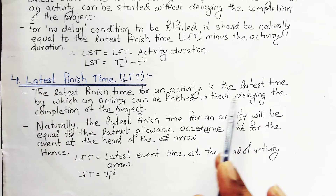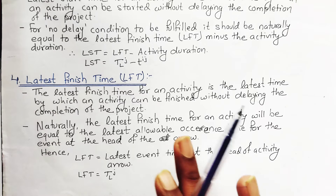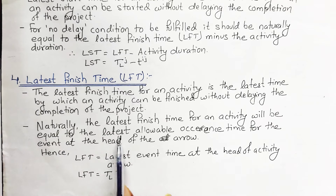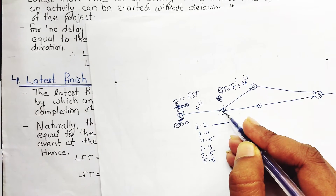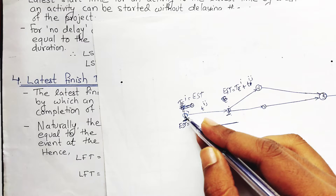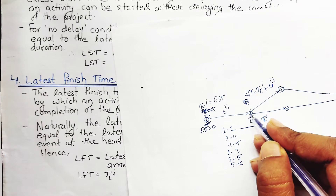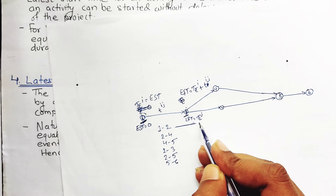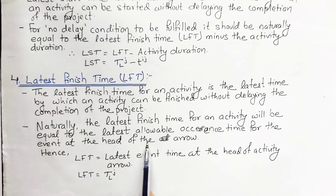The Latest Finish Time (LFT) for an activity is the latest time by which an activity can be finished without delaying the project completion. Naturally, the latest finish time of an activity is equal to the latest allowable occurrence time for the event at the head of the arrow. So for activity I→J, LFT = T_L(J) — it corresponds to the head event of the activity arrow.